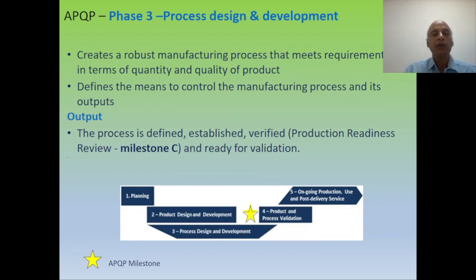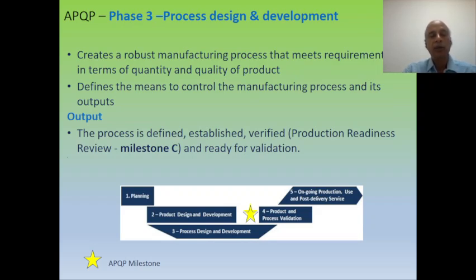Phase three is Manufacturing Process Design and Development. In this phase, we create a robust manufacturing process that meets requirements in terms of both quality and quantity of the product to be manufactured. It defines the means to control the manufacturing process and its output. Outputs include a defined process and manufacturing sequence to produce a quality-confirmed product. The milestone here is establishing and verifying the Production Readiness Review, confirming we are ready for validation.